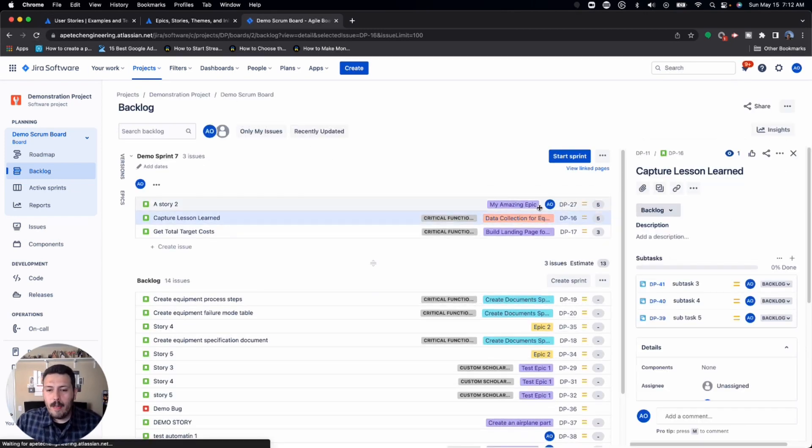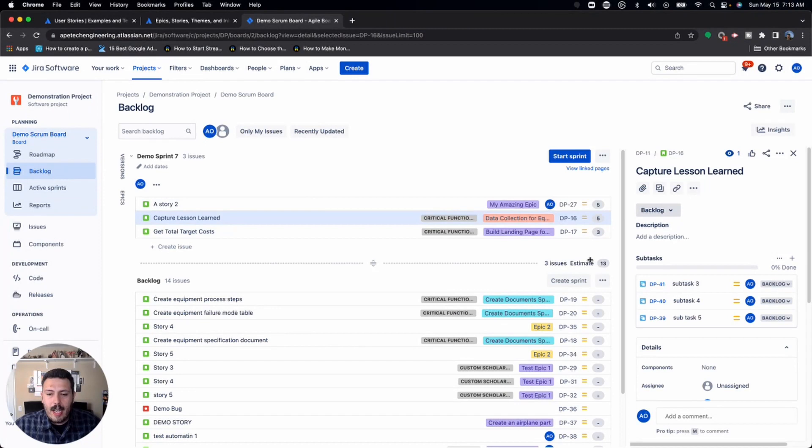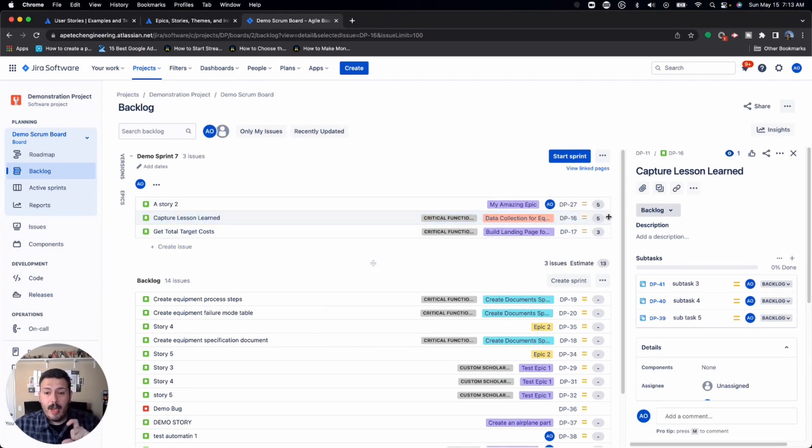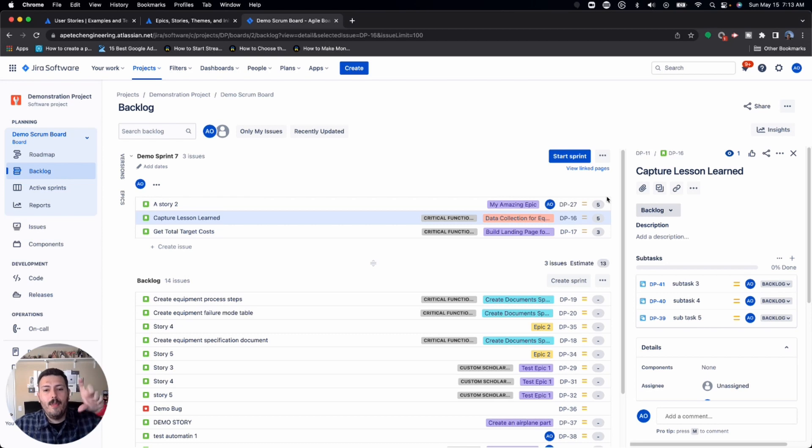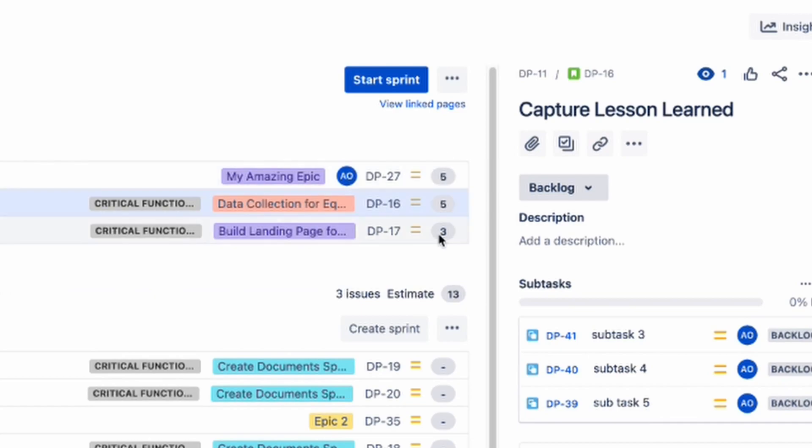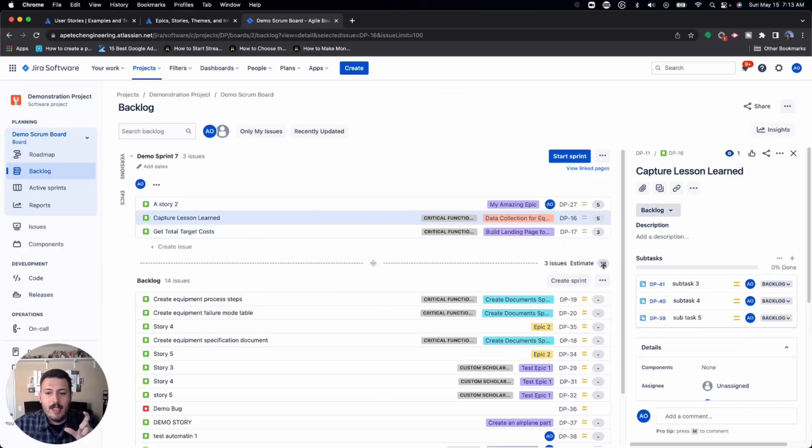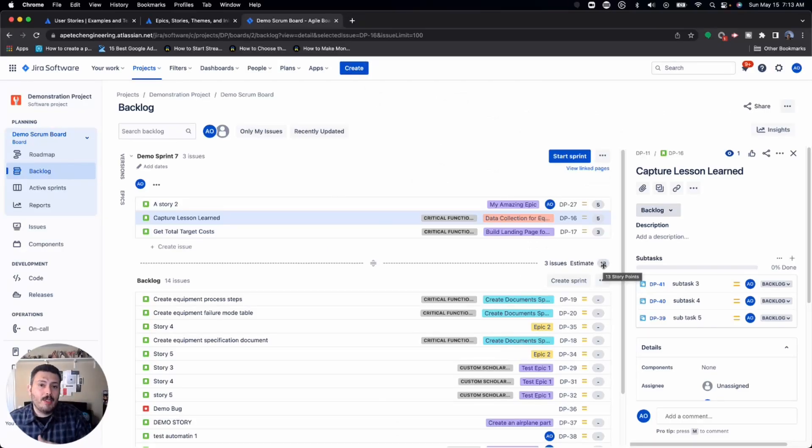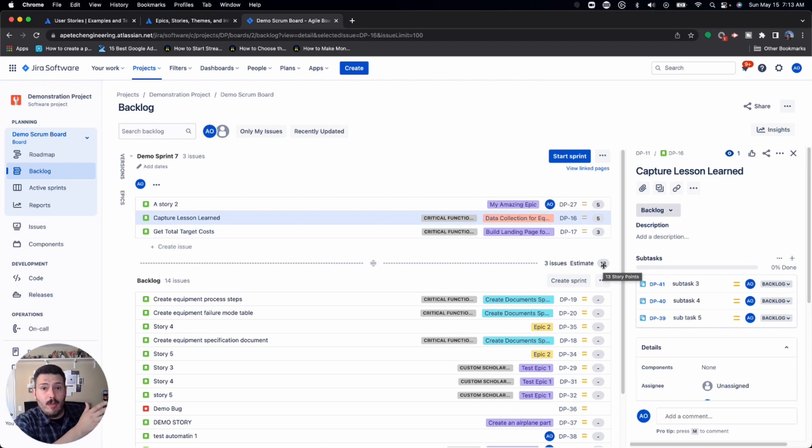And so a couple of things that I want to show you here that are going to be beneficial. They're going to help you make sure that maybe you're the scrum master, you're planning your sprint, maybe you're the developer. You want to make sure you're appropriately tasked. One, this estimate here is a summary. It's a summation of all the story points for all the individuals that are in this sprint. And so you want to make sure that this looks good and that this is basically going to be your overall team's capacity, which then should be reflected off your team's velocity from previous sprints.